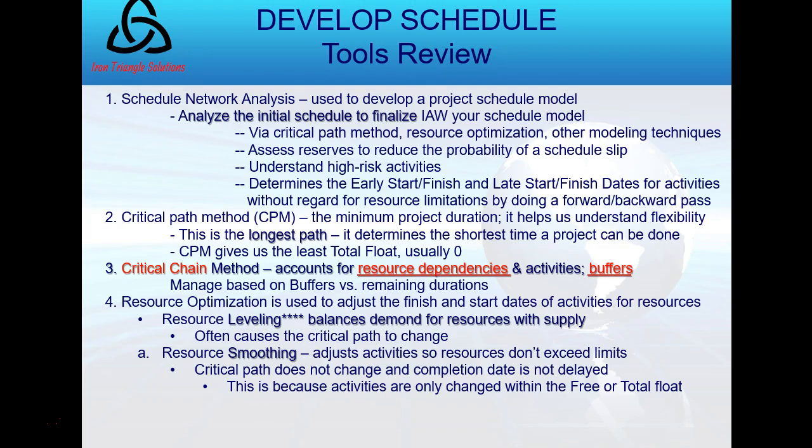The critical chain method, I said that was another PDM, precedence diagramming method. When you read the short blurb about it in the PMBOK guide, note these two different sets: resource dependencies and buffers. It doesn't give you extra time, it gives you buffers. It takes time out of the schedule and puts it at the end in a buffer that the project manager controls. But to do that, the project manager needs to be very careful and manage resources. So two keywords on any test question would be resource dependencies and buffers.